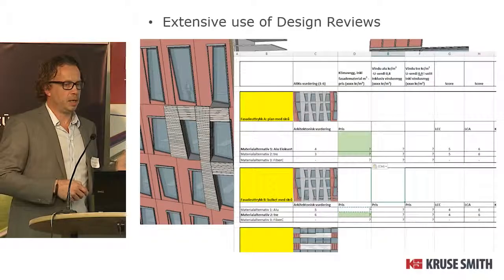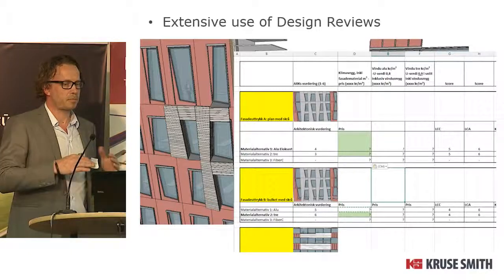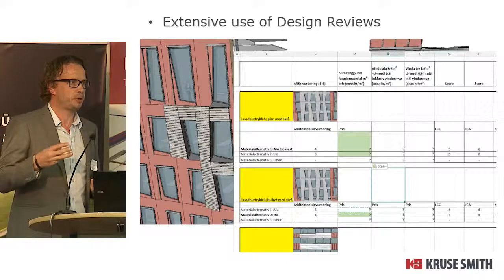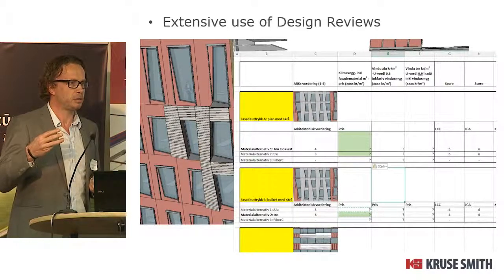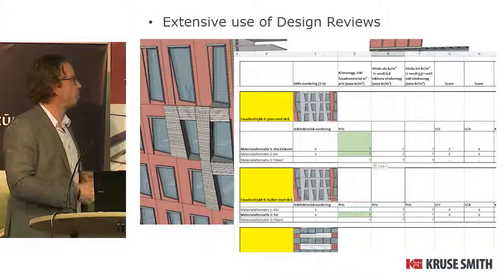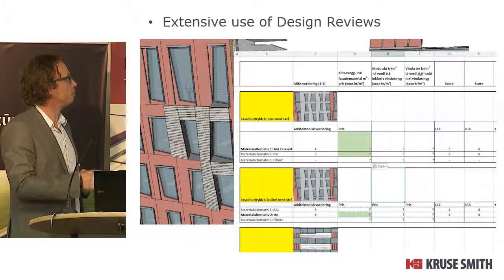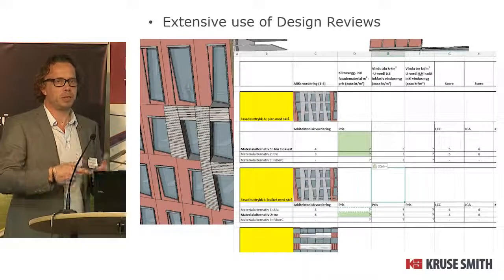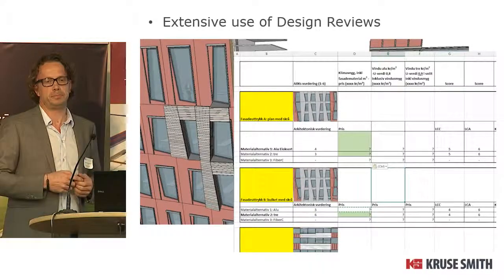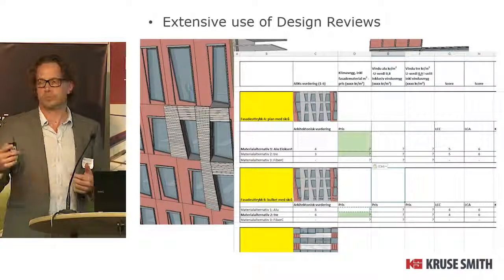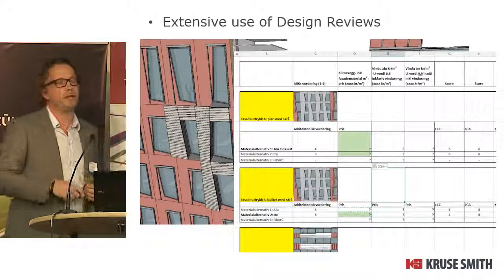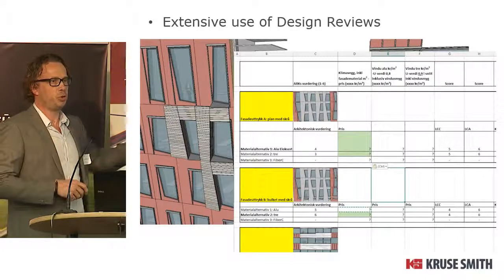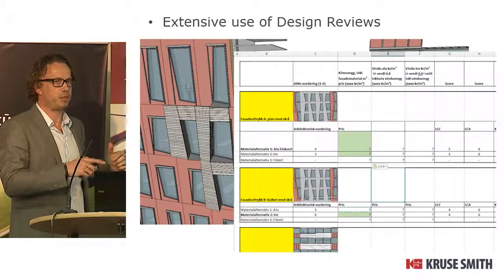We took that in and prepared our spreadsheets with 3 different materials for each design. And we also made some other criteria like LCC, LCA, prefabrication ability, etc., and HMS, health and safety issues. And we all discussed all those issues for all the 3 times 3 options.